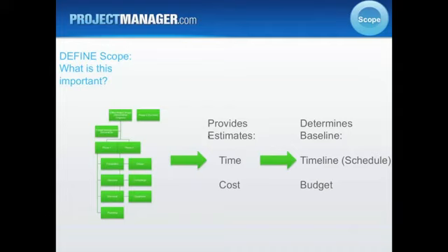By producing these up front and using the deliverables diagram to paint the picture of what's in scope, it's used for several things. It's used to provide information for time. Each one of the green boxes that produces a deliverable, we associate time with. How long is it going to take to produce that?